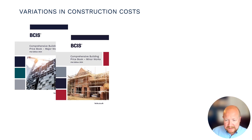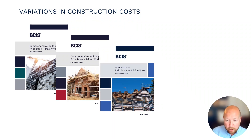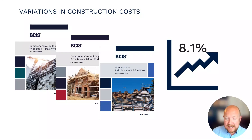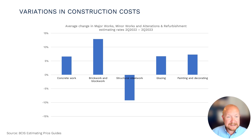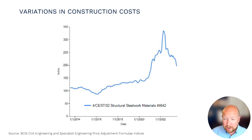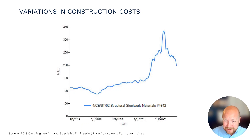This data is hot off the press from our estimating guides — our major works, minor works, and alterations and refurb data sets available as printed price books and our online schedule of rates. There was on average an increase of 8.1 percent from the second quarter of last year to the second quarter of this year, but within that average there is significant variability. This chart shows a selection of trades and as you can see they are not uniform. Looking at structural steelwork specifically, our civil engineering and specialist engineering indices show that materials cost inflation for structural steelwork remains historically high going back to the end of 2013.